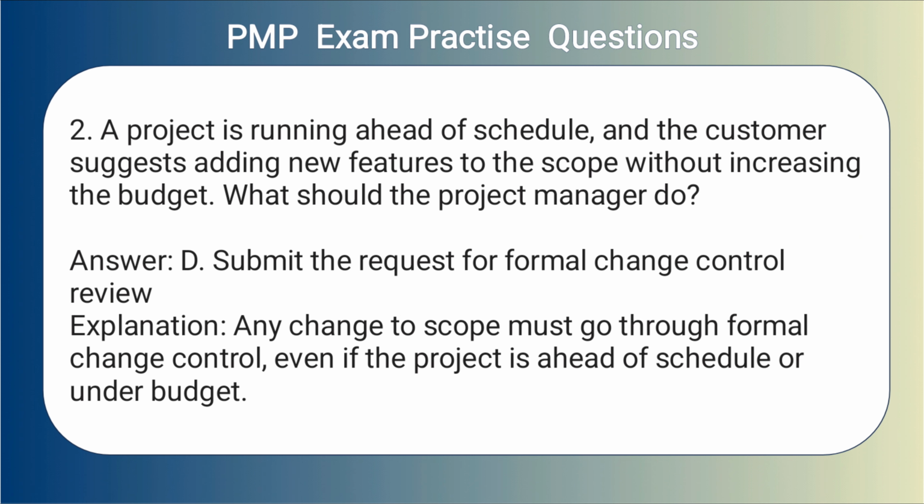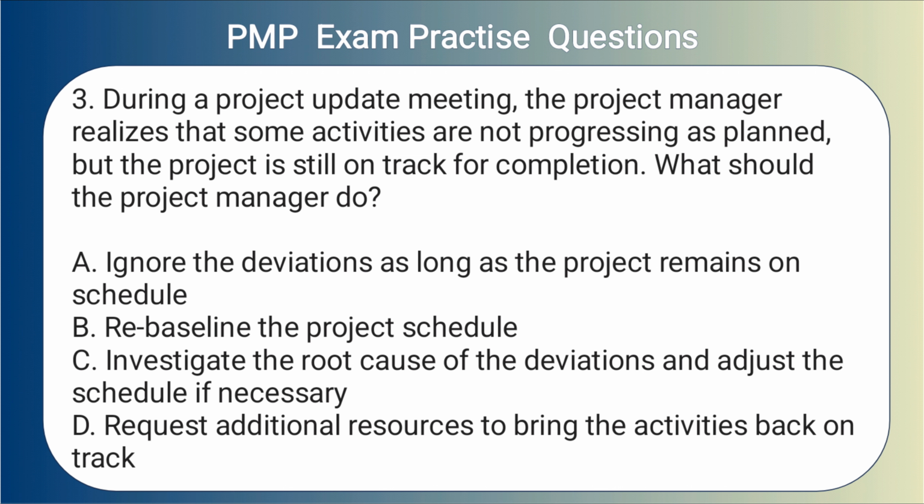Answer. D. Submit the request for formal change control review. Explanation. Any change to scope must go through formal change control, even if the project is ahead of schedule or under budget.